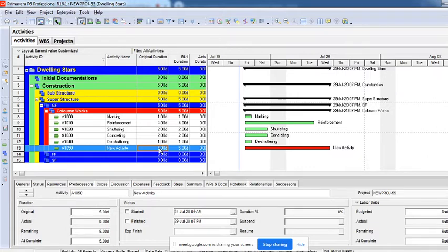Who is going to do it and how we are doing it. Is it labor, manual, automatic, machinery, and how much productivity it brings. So we need productivity and quantity. If you know the quantity and the productivity, automatically you can tell in how much time we can do this. That is called parametric estimation, where you need both parameters.